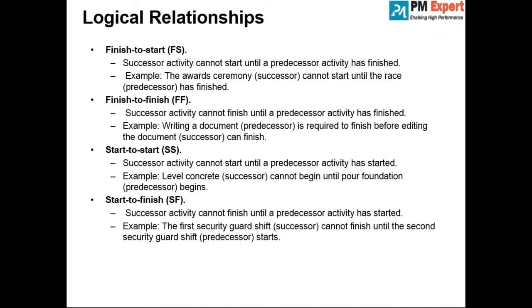For example, in IT environment, you procure licenses and you allocate licenses to the people. The first cycle is finish to start, but afterwards, you don't keep on procuring licenses. You see the successor, how many licenses have been allocated or consumed. Based on that, you trigger procurement. This is an example where completion of successor drives the start of the predecessor.